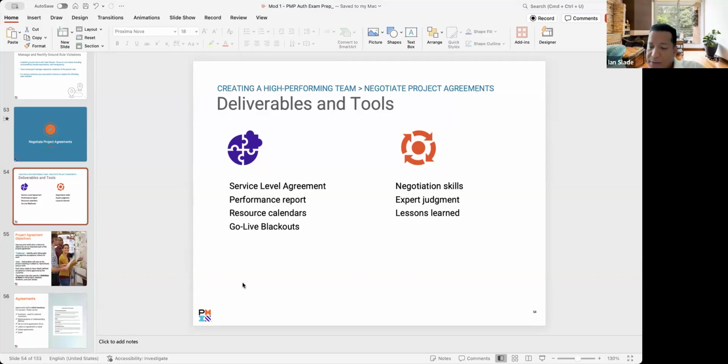And okay, one thing for lessons learned. When you think about lessons learned, what comes to mind? What lessons are usually shared? Like, these are our lessons learned. Is it positive or is it negative? Negative, I would say. Right? And that's just human tendency. Lessons learned is almost always the things that went bad. So for the test and in real life, make sure that you also capture what worked. What were the good things? What made the project successful? So you want to talk about the good, the bad, and hopefully you don't have this, but the ugly. Good, bad, and ugly.